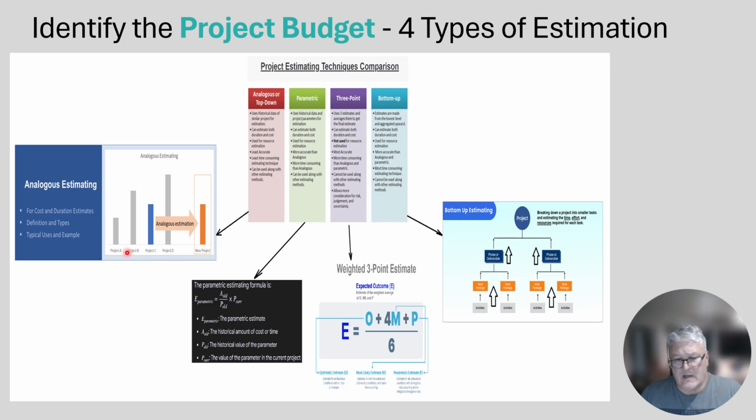So what we do, we look at past projects, and we try to find a project in the past that was similar to the one we are doing now, and we use those values, and then you work backward for your work breakdown structure and the activities that go into it to provide your analysis for time and costs.